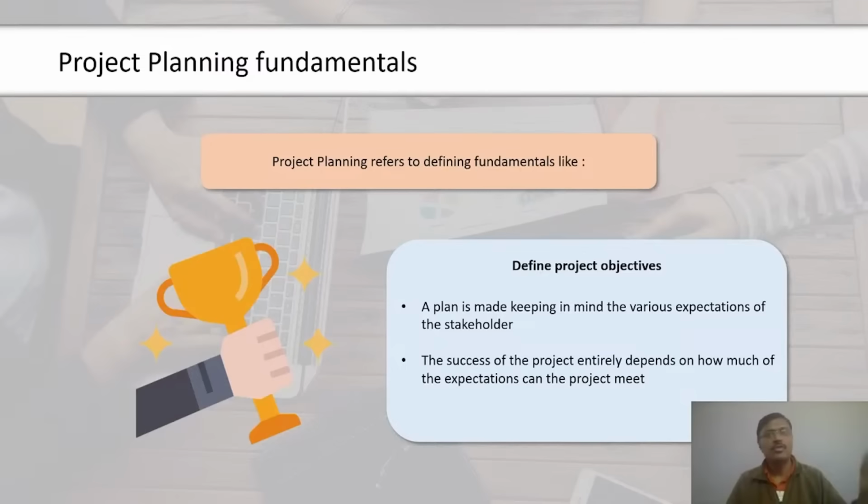First, calculate the early start and early finish dates. Activity 3 can start only after activity 1. Since the early finish of activity 1 is 3, it becomes the early start of activity 3. Activity 3 cannot start earlier than 3 because activity 1 can be completed only by then. Therefore, early start of activity 3 is 3, and since the duration of the activity is 4 days,